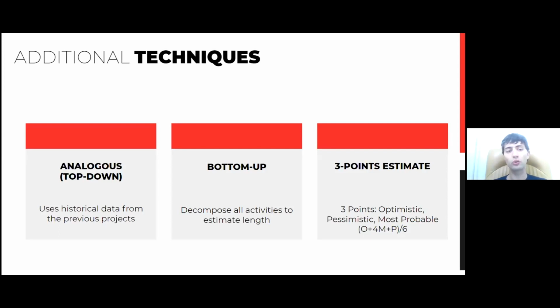So basically, when client explains some basic features of the project, you could, as a project manager, almost always find similar projects from your past, and you already know how long those projects took and how costly they were. So you already know the scale of the project, and you could tell that I see that this project will be something like $400,000.